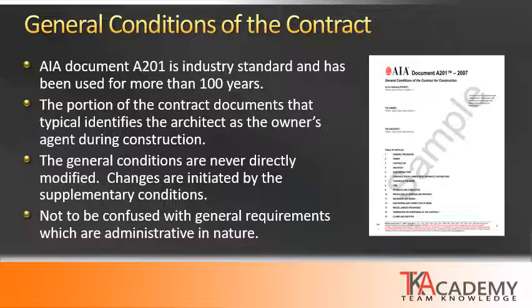One last thing I want to point out on this is that this often gets confused. The general conditions of the contract gets confused with the general requirements of the contract, which are not the same. General requirements are in the specifications, and they are administrative in nature. They are not necessarily contractual.